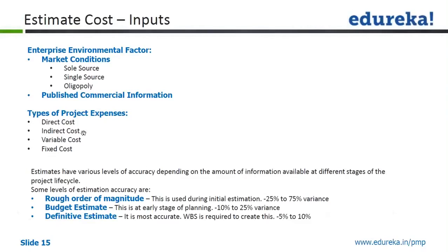let's say you're taking help from legal. Since legal is a shared function across various projects, you cannot easily quantify it into the project cost. So how do you do it? Let's say 10 projects are going on, so you assume 10%, though all are not equal, of that person's salary cost, or whatever team of experts you are using. Their salary cost can become your indirect cost.